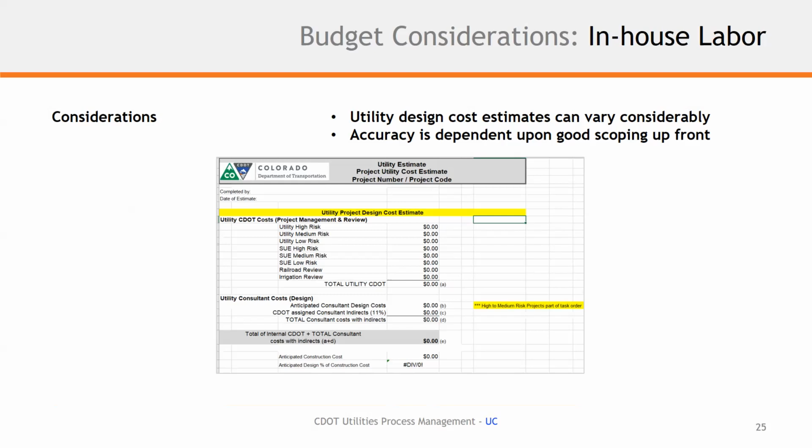So we've created this really flexible multi-tool calculator that helps us determine very high level, large round number costs initially, to put those in the budget and earmark a spot for utility specific cost very early on. And then as we learn more about the project, we tweak those numbers and get a better idea. But I like to say, get the utility foot in the door here on cost and give your project manager an idea of some of those costs going forward.